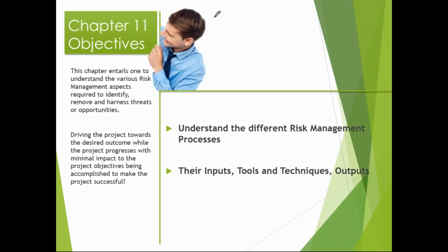So you have identified different risks, right? Let's say you have identified 3 risks which can impact your project. There are only 3 risks that you've identified. Now there will be hundreds and hundreds of risks that you identify for your project, but I'm trying to make it simpler here. Risk 1, risk 2, and risk 3, these are 3 risks that you have identified. For each, we need to look at the impact and the probability, which is called the expected monetary value. Impact is going to be, let's say, $100, and probability is 50%, right? So first risk is, this is your impact on the probability.